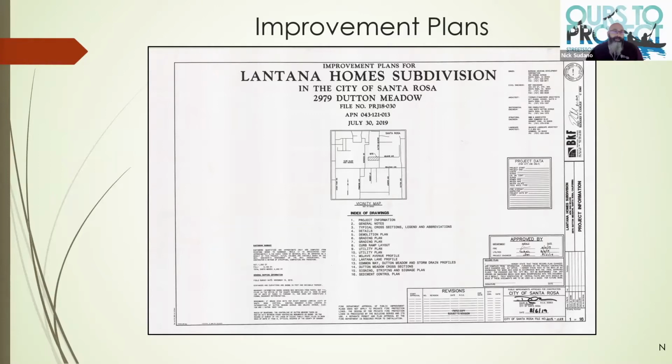So one of the things that I just wanted to point out that is a requirement of LID submittals is the improvement plans. So the improvement plans will actually have the LID feature on here. And so it is something that we require upon completion of development. And when we go out to inspect, we are inspecting those features too. And so I really wanted just to point this out, that upon construction completion, the cities require, during the city acceptance process and punch list phase, we will be looking at the design components and elements to make sure that they meet the intent of the LID manual.